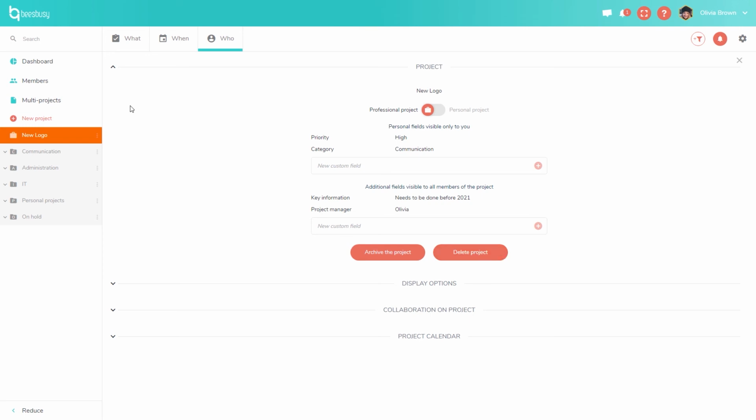There's also another option available. It's to duplicate your project. This is very useful to combine with the archiving feature. You can always create a template project, and then you can archive your template to be used later. Once you need your template, just unarchive the template project, then duplicate it, and then you can work on the copy just like a separate project.